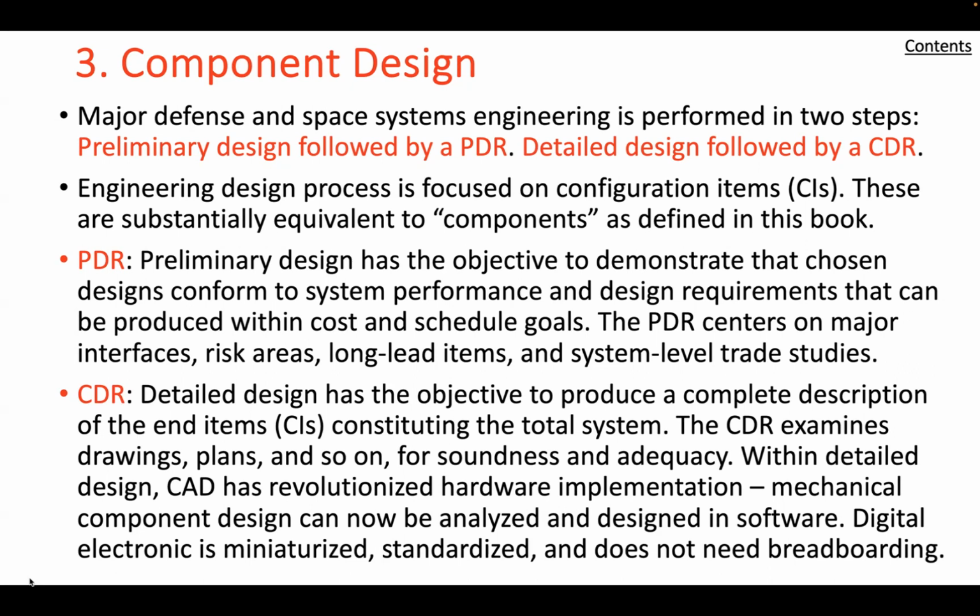Prior to the formal PDR, the development team should arrange for an internal review to ensure that the material to be presented is suitable and adequate. The preparation, organization, and qualification of the review process are critical. This is no less important for commercial systems, even though the review process may be less formal, because success of the development is critically dependent on the quality of design at this stage. The completion of preliminary design corresponds to the establishment of the allocated baseline system configuration.